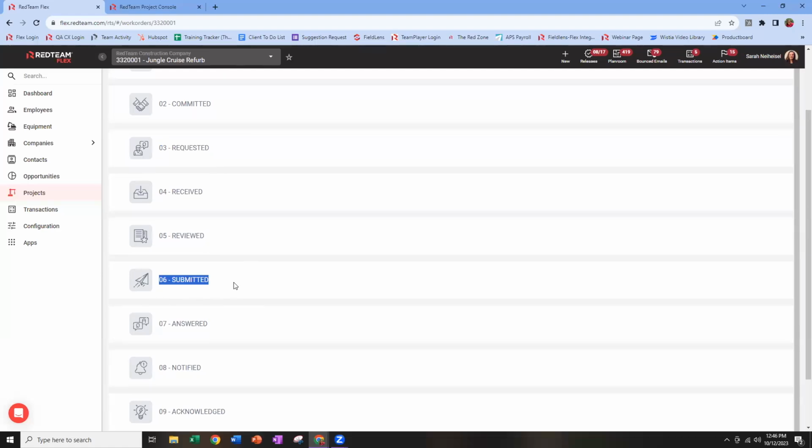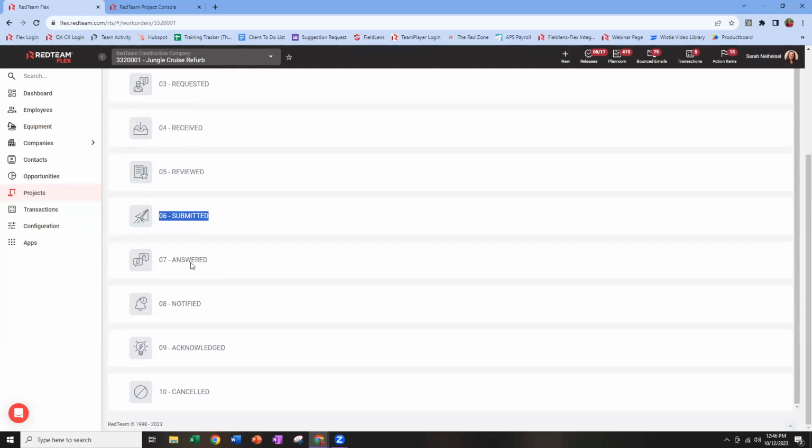That's normally an architect or an engineer, but it depends on your situation. You'd send that in with email number 2 to get it approved or rejected. When you receive that answer from your architect, engineer or owner, you send email number 3. My third and final email is to notify the vendor of the answer and let them know if any additional action or resubmission is required. They will acknowledge, and that's the end of the workflow.